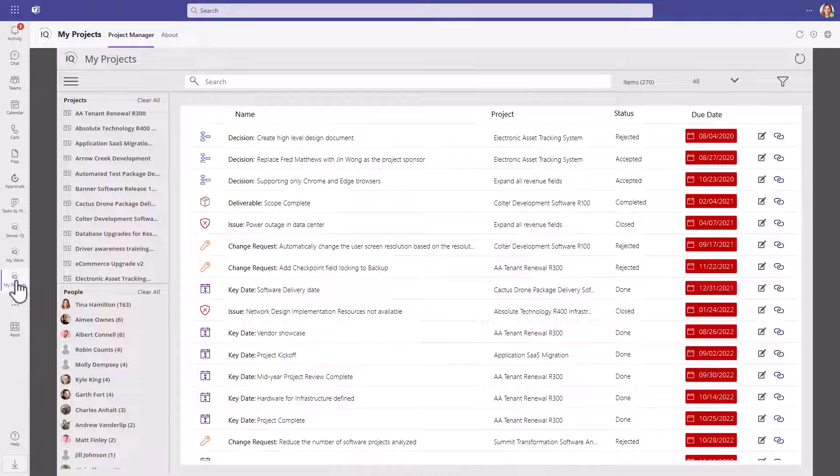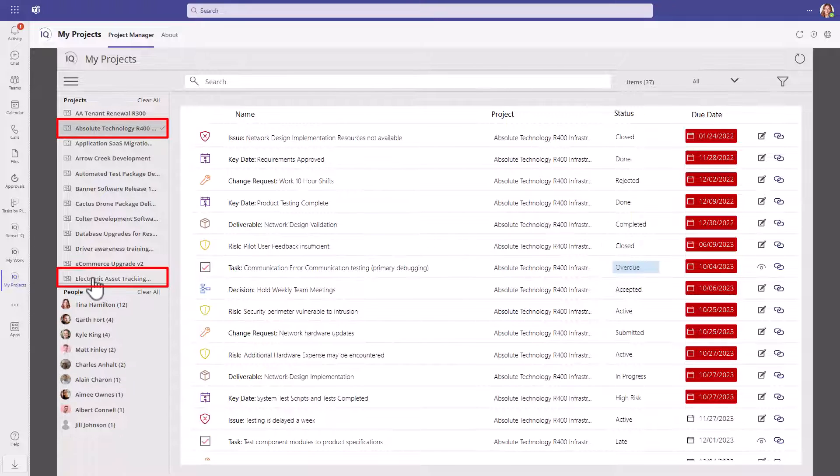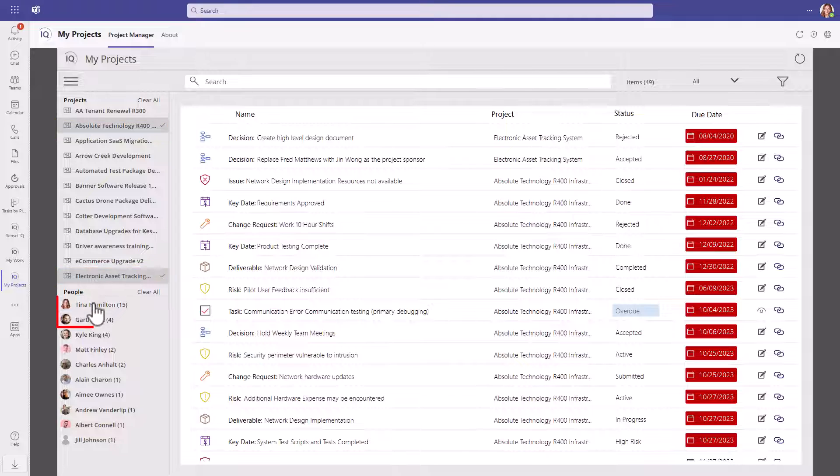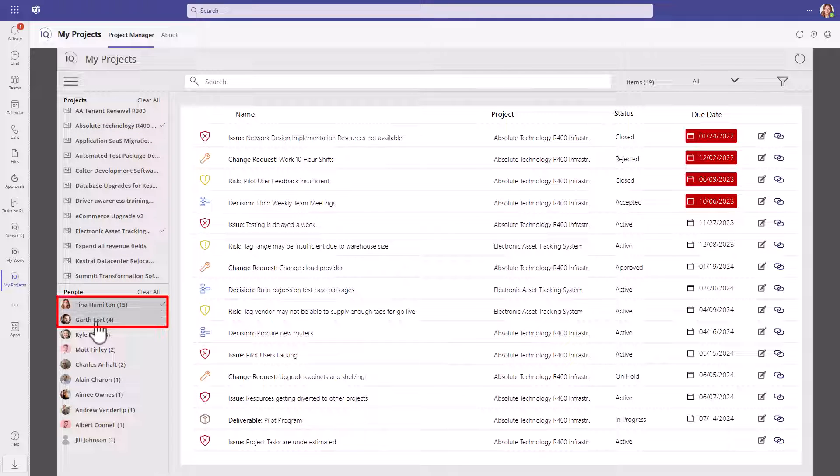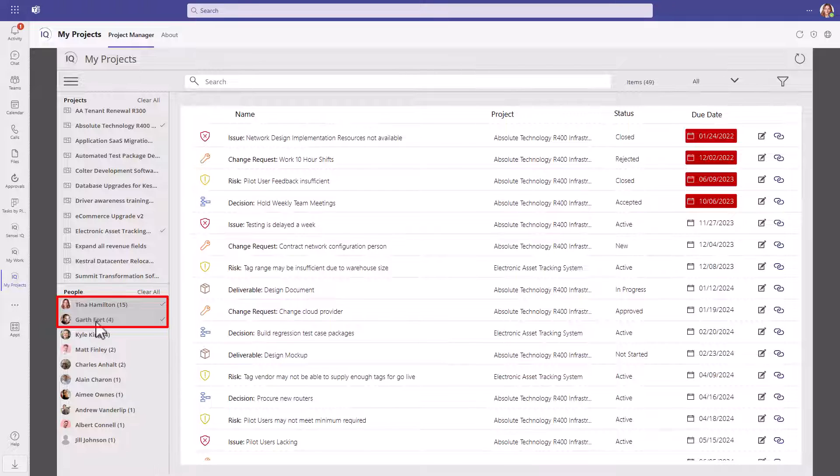You can filter by project, by person, or a combination of both. By selecting My Projects from the left sidebar and then selecting the Absolute Technology 400 Project and Electronic Asset Tracking Project for Tina Hamilton and Garth Forth, you can see just the activities assigned to Tina and Garth for these two projects.